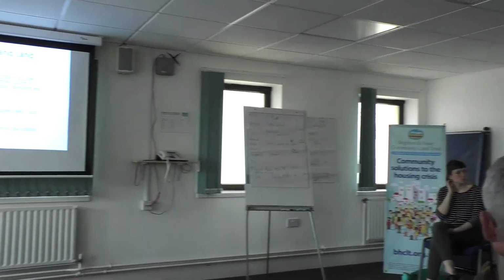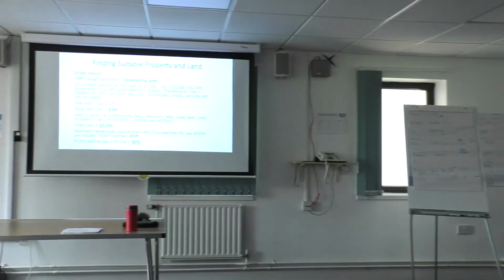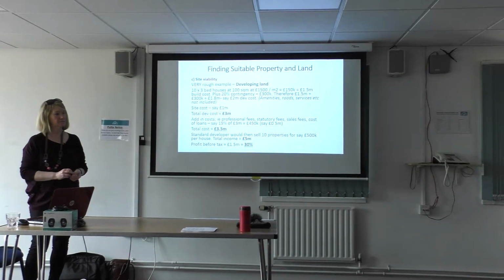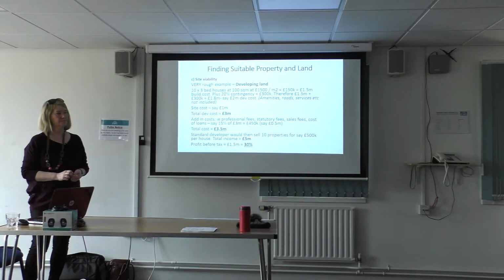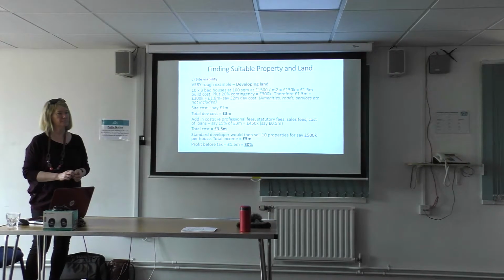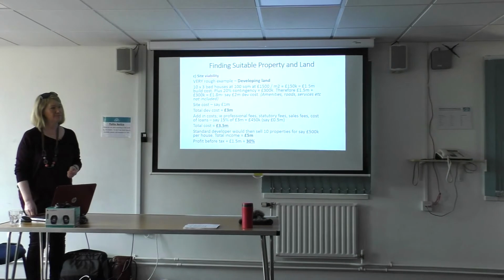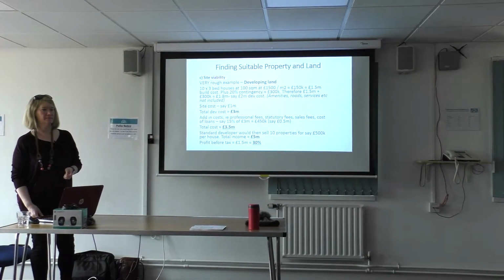Sweat equity is where you do stuff that you would normally pay someone else to do. But again, you've got to be good at it, because if it takes you three times as long as someone you're paying to do it, then it's not efficient in terms of your time, unless you treat your time as zero cost. So it's not simple to just say it's really easy to save money doing self-build. You've got to be reasonably good at self-build. You've got to think about doing it efficiently, not taking years and years and years.